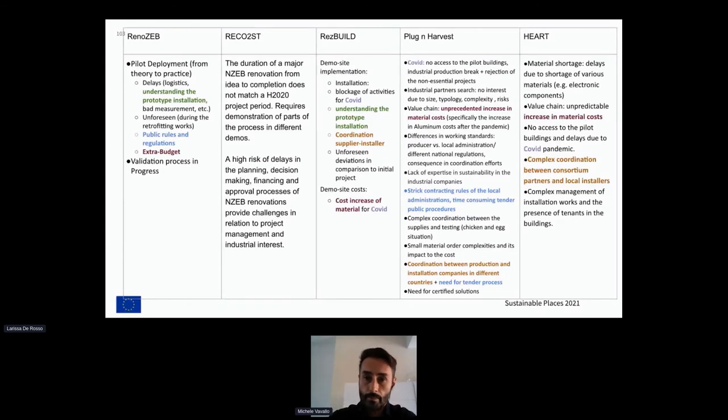That sounds actually great, Michele. It would be nice to see those videos also for us, in general. I just wanted to add that there is actually a funny experience in these terms, because in some other projects that we've worked on before, the installers finally applied different technologies than the ones we proposed, for example in terms of anchorages or connections. They just said, oh, we don't know this system, so we are going to use the one that we have known forever. So this can also happen.